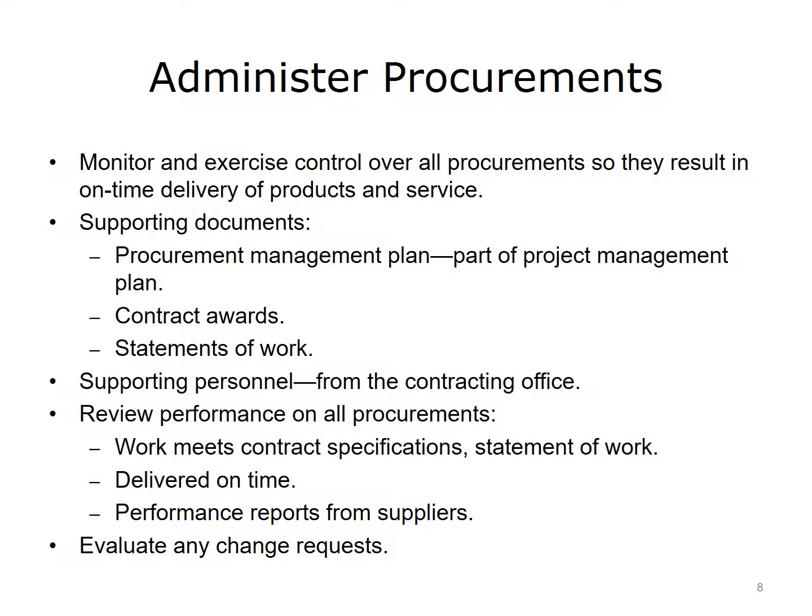You will also need to monitor procurements, which includes the various equipment and software and hardware products required to complete your project. Your overall project management plan should include a procurement plan that abides by the process required by the customer organization. These processes will affect your schedule in different ways. For instance, if it takes six weeks to receive a piece of hardware from a specific vendor, be sure to factor that into your plan. Update any changes to the plan and communicate these updates.